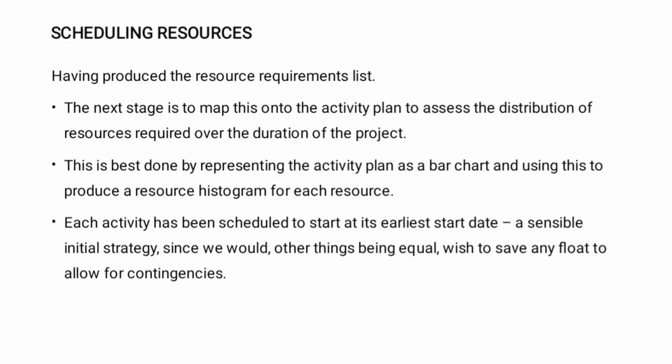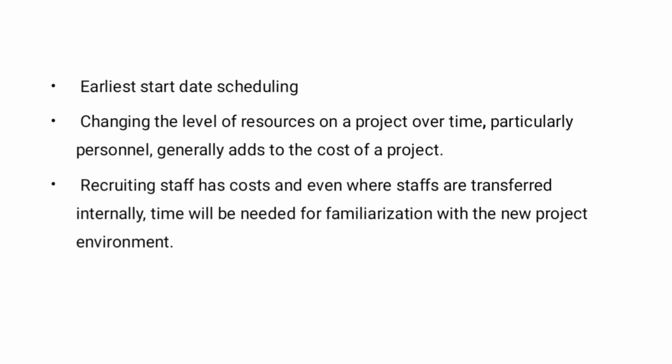Each activity has been scheduled to start at its earliest start date, a sensible initial strategy since we would, other things being equal, wish to save any float to allow for contingencies. That is earliest start date scheduling.